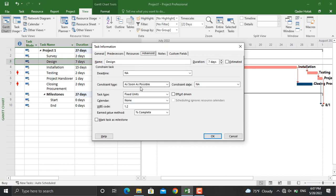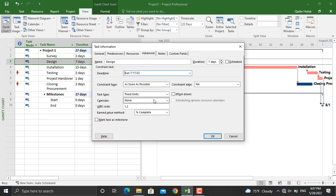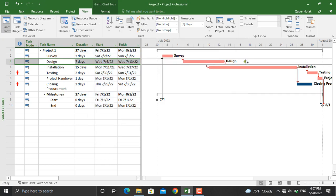For the deadline, we can set a deadline for this activity. For example, let's say it should not be completed any date later than 17th July. Once we click OK...